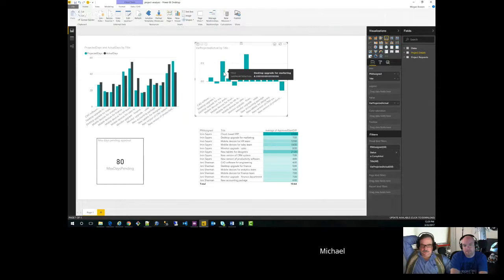But anyway, if you looked on average across all the projects, it looks like Irvin and, I can't remember the other person's name at the moment, were fairly even in terms of their ability to estimate. But it's because one of the people was pretty good all the time, and the other person was either way high or way low all the time. So you can take a look here and see, based on the different projects, which projects came in either lower or higher than the estimate.